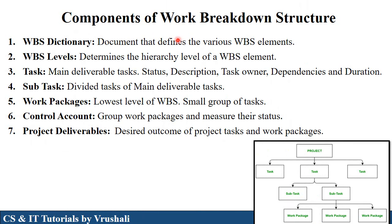Now the next topic is components of WBS. The first component is the WBS dictionary. After generating this structure, it is mentioned in a particular document, and this document is called the WBS dictionary. Project managers send this document forward to designers and developers for development purposes. The second component is WBS level, which refers to how many levels are in the WBS structure — how many tasks, subtasks, and sub-subtasks. This is called WBS levels.